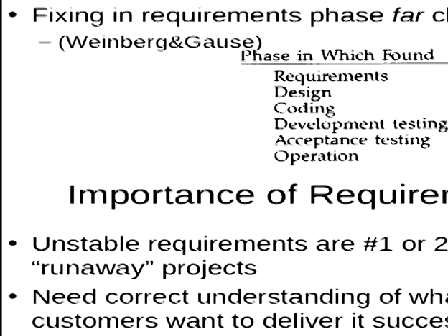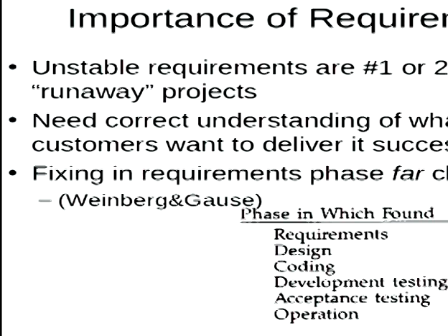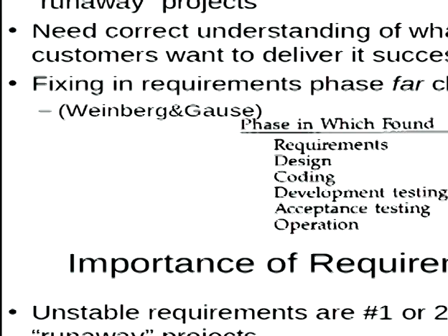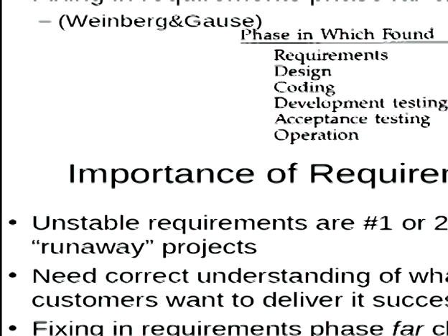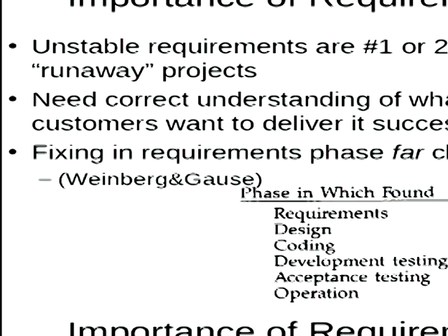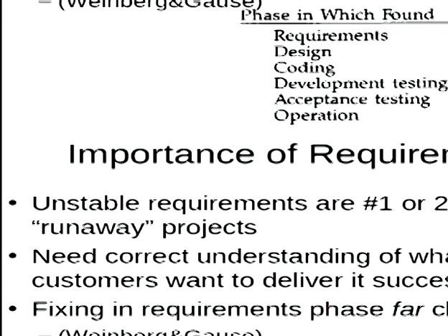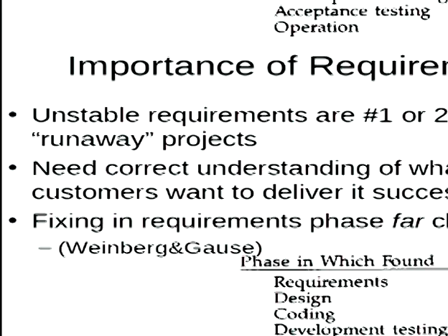Yeah, the whole design of the system is often through what data structures you have, what abstractions you're maintaining, how they interact with each other, what methods they offer. Okay, what else? Okay, so budget, that's kind of a derived thing from these things, because if you've got to pay people to recode all these things, you're going to be charging more money. But what things go along with code in a healthy test environment? Tests, okay. So there's a lot of tests that typically will have to be redone. What else will go along? What else do you deliver to the user besides running code? Documentation and help systems, those sort of things, right? These things are all dependent on the requirements.